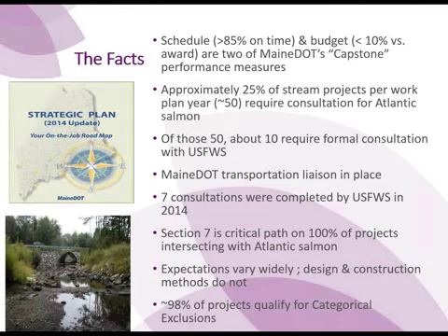The expectation is that 85% of our projects will be delivered on time, so within 30 days of the originally forecasted advertised date, and on budget, so less than 10% different from the award price. So these are the 2 that are most relevant and were most affected by consulting for salmon. About 25% of our stream projects per work plan year require consultation for Atlantic salmon.